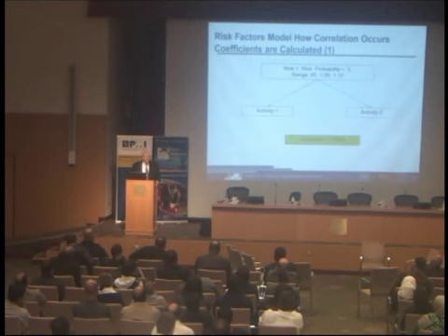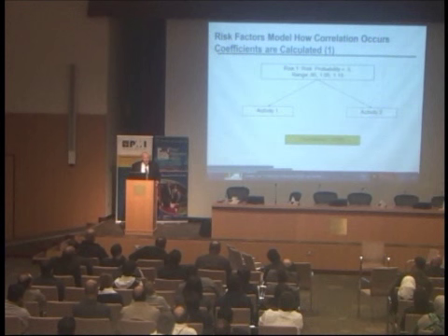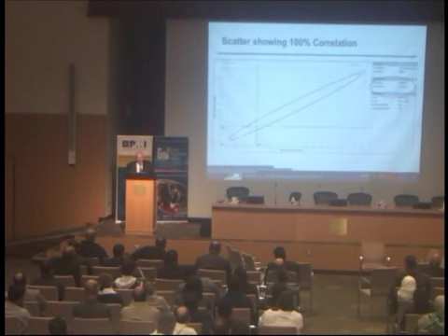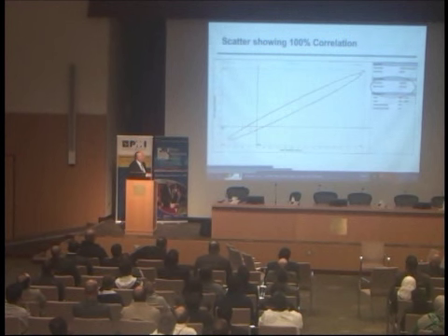And if that's all that's happening, they become 100% correlated. And you say, well, nothing's really 100% correlated, but this is a signal. The fact that it may be 98% or 95% or 87% correlated because nothing's perfect, that's the noise. So let's get the signal right anyway. But I say, look, and here's the picture of 100% correlation, and you see they're 100% correlated.